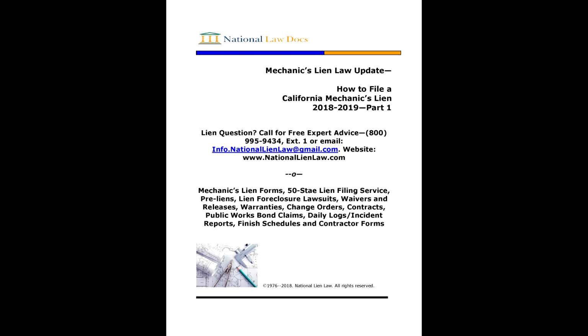You should be licensed for all times during the job, but if you inadvertently fail to register your license, you can argue there has been what is called substantial compliance. But you never know what the judge will say. Under California Business and Professions Code Section 7031(b), the owner can now sue you to recover back all monies paid if you were an unlicensed contractor. So be very serious about this. You can be an individual doing business under a trade name or a corporation or LLC or even a partnership. Although it might be a good idea to have a corporate resolution, this is not required before recording the lien.